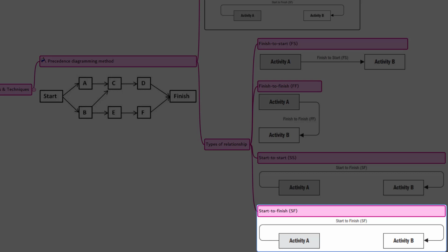Another very important point to remember related to relationships. Generally, multiple relationships between the same activities are not recommended. So, a decision has to be made to select the relationship with the highest impact.